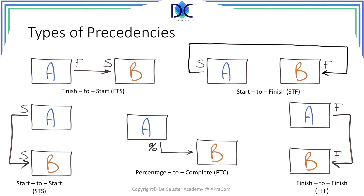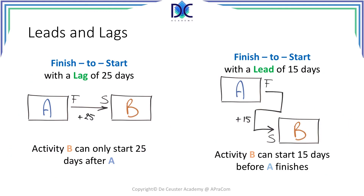In the percentage-to-complete relationship, task or activity B can start when task or activity A has been completed for a certain percentage. Activity A does not have to be completed totally before activity B can start. Now let's have a look at leads and lags. What is a lag? A lag is a delay between the start of a successor task and the end of a predecessor task. In our case, I selected a lag of 25 days, meaning when task A finishes, activity B can only start after waiting 25 days.